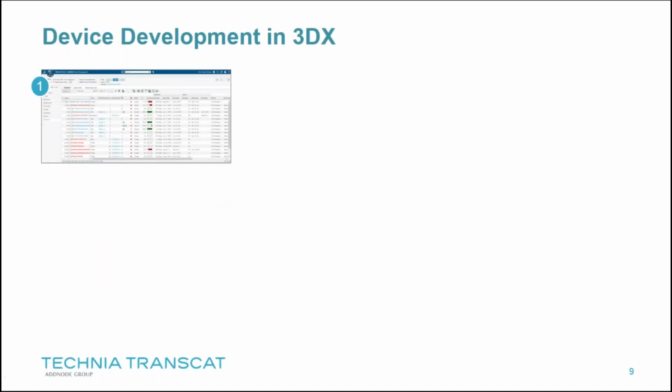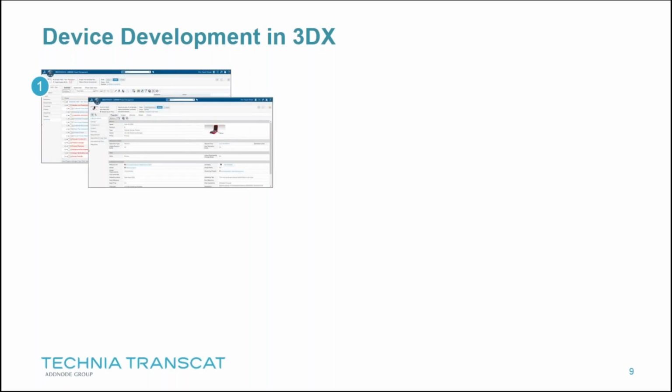So, in summary, on device development, the tools we use to track product development is, of course, the project state, and it's made up of the status of current tasks. Every task has a due date, and when done, it will show what's the progress. We can do the planning and resource planning here if we want to. We definitely want to track the deliverables to see what's the DHF build-up, what are our different deliverables, either project deliverables or product deliverables or the actual DHF.